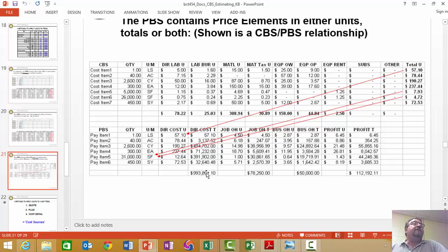Ain't much. And it's easy in Excel to spread that, boom, boom, boom, boom, boom, by cost contribution to the total of the direct cost items. That's the way I would do it. If you have a better way, fine. Just tell me what it is in the basis of estimate.